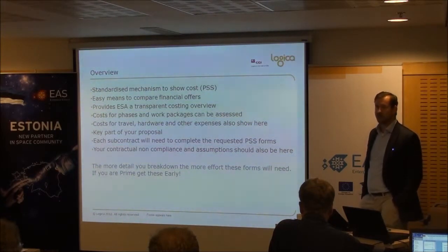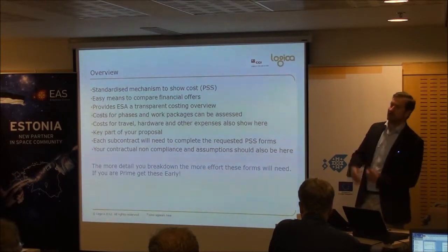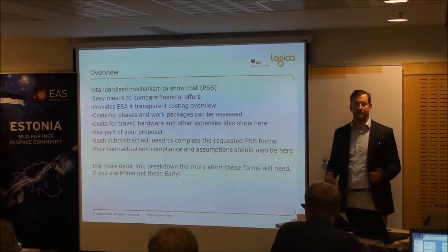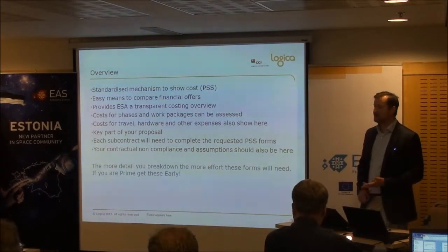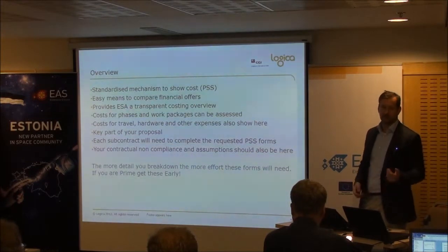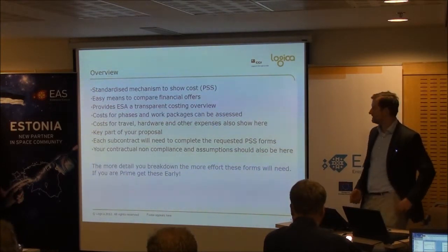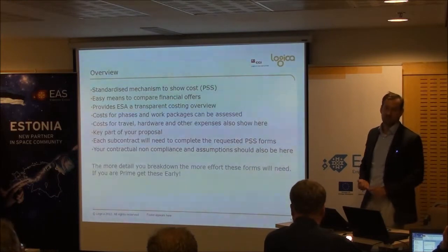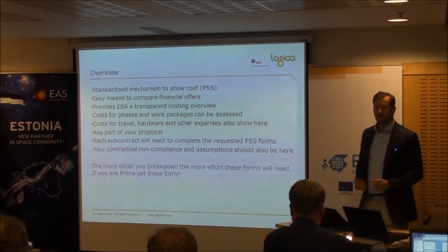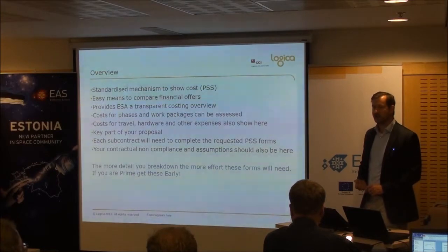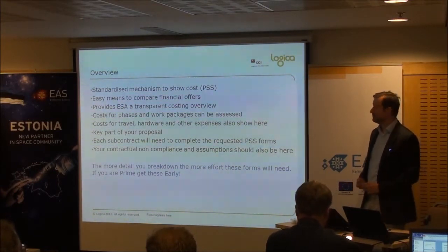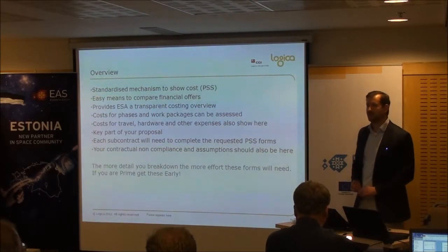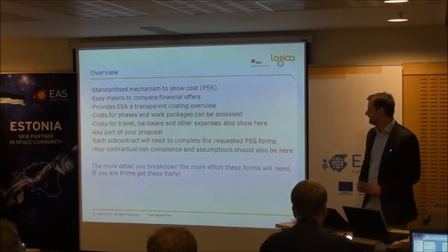In here you can also break down the costs for a particular work package, so they can see the cost of the overall job, the cost of labour per category type, the cost of each work package, any travel or sustainability costs such as hotels or out-of-pocket expenses, maybe the cost of some particular type of facility that you may need, more applicable in hardware or some kind of safety system where you may need to borrow a test bed of some description from someone else. Maybe some particular costs about your facilities. So every subcontractor will also need to fill these in.